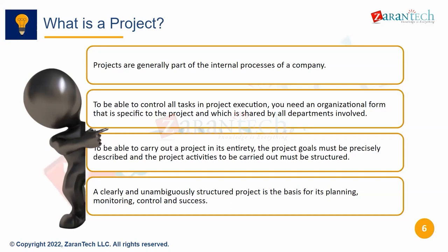An internal order is a cost object where you just have a budget. Let's say you put a 10 lakh rupees budget on that internal order, and you keep track of your purchases or other cost bookings on that internal order. At the most, we have budget control over there. So for small events, event tracking or small projects, yes, we can use internal orders. But when the project size is huge, you need to keep track of the scheduling because there are so many activities involved.